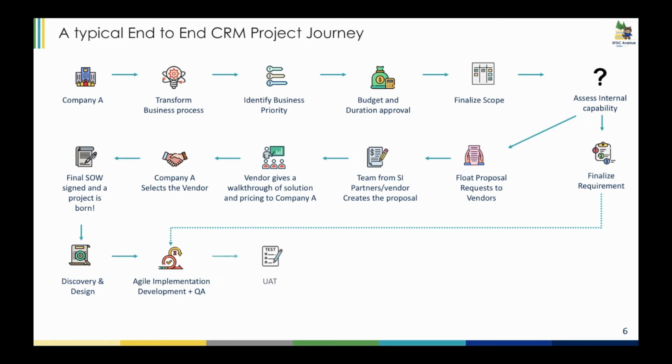Once that is done, it will move to the user acceptance phase, where the customer will test the solution and give a sign-off if the solution is good. Once UAT is passed, the implemented product will be launched and it is go-live. Post go-live, there will be warranty support from the vendor, mostly from 2 to 4 weeks of warranty phase that I have seen.